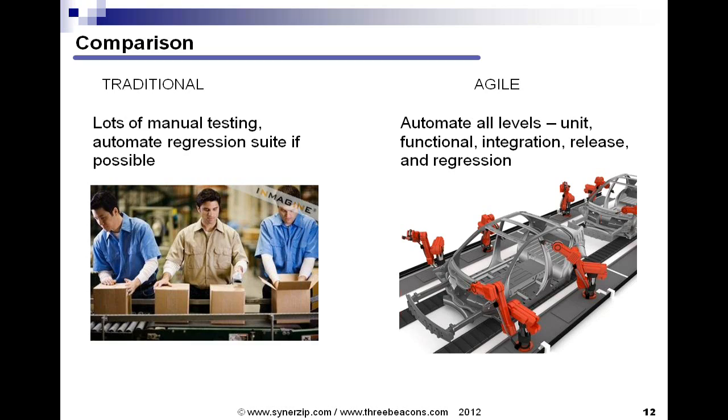into their life cycle. And then obviously QA comes in and does the functional sashimi testing, the integration testing as you go, the release testing, and then maybe a regression of the previous delivered sashimi slices. This makes it very easy to verify that existing functionality is not harmed by a bug fix or a new feature. And as you can see, this is where automation comes in, and that becomes very important.